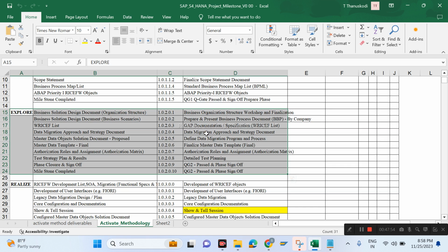Somebody is asking, could you tell me about cutover activities? In any project you implement, cutover activities are very important. Once you finish the business blueprint, we do the configuration and testing of all the processes. Then we upload your master data for every module. If you talk about materials management, you have to upload your material master, your vendor master, the service master, and your initial stock. All the stock also you have to bring from your Oracle system to SAP.